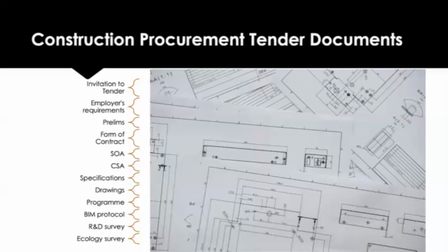So it sounds like quite a lot of information, but it's necessary, because the problem you get with construction is if you haven't given all of that information up front and the supplier gives you a price, they won't necessarily know about things like bats or newts or asbestos. Whereas with this, they've got that information in advance, which enables them to price it appropriately. You wouldn't want them to price it assuming that none of those things were a problem, and then a month or so into the construction, they start to ask for extras because they hadn't considered those bits.